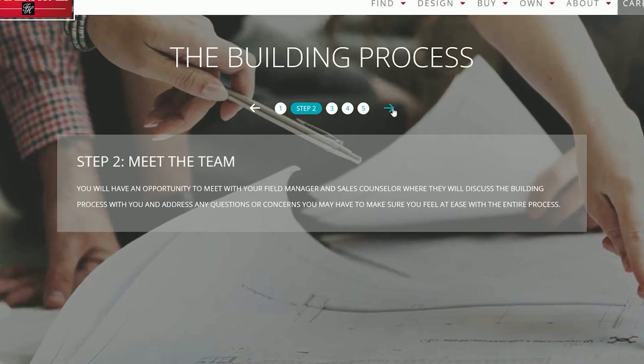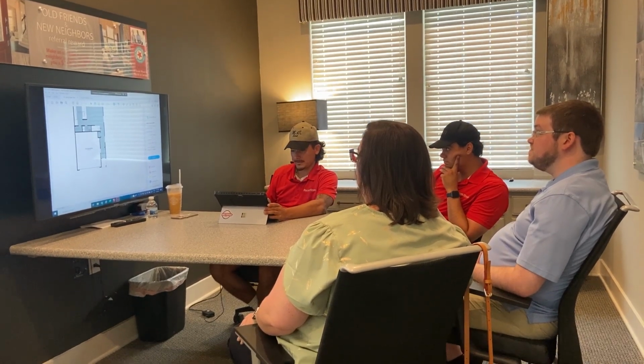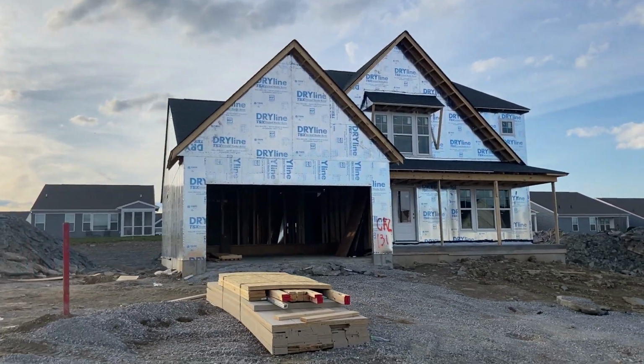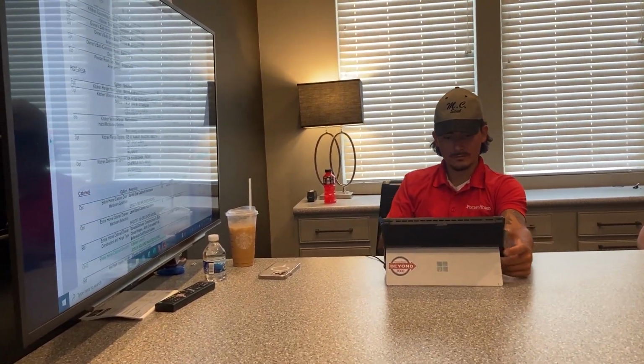Awesome. Well, tell us a little bit about what we did here today, the pre-construction meeting. What's the purpose of it, and what are the goals of the meeting? The main reason why we do them is to meet the customer, put a face to a name. Also to go over their home, review with them the plot plan, construction prints, selections, everything they picked in their home, make sure everything matches, make sure they're happy, make sure there's no errors in that process. That way, moving forward, if there are any issues, we can correct them right away, and that way the customer's happy.